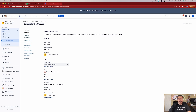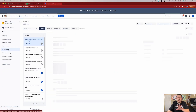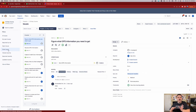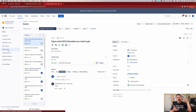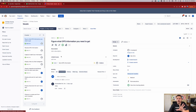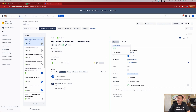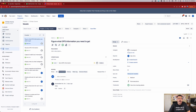Your shares here is going to tell you who can see this board — this is critical. It basically means anybody that has access to this project is going to be able to see the board. You could restrict who can see the board through your filter, but if they can still see the project, they're going to see the issues — they just won't see them in the board view, but they can still click on issues and see them. So if you really truly want to lock things up, you're going to have to create a whole new project with a whole new board and a complete set of permissions for the right users. While you can lock up the board view, people can still see the data in it and update issue statuses.